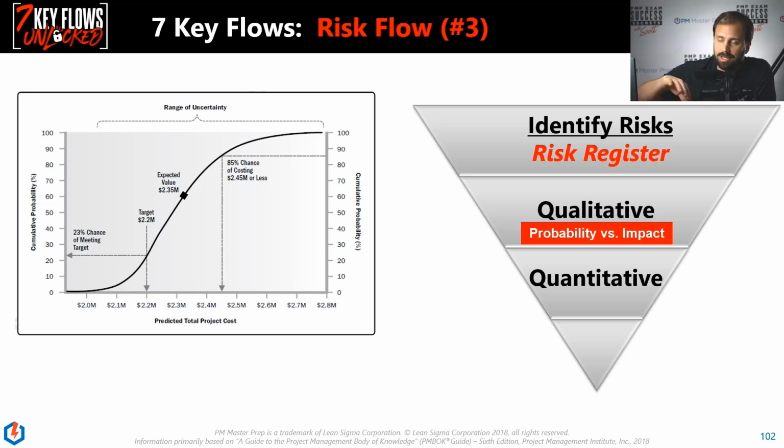And what it does is it creates a curve. These are just little dots really close together, thousands and thousands of dots, and it makes a curve, all right? And so here's the example right here. There's an 85% chance of our project costing 2.45 million, we see here and here, or less. All right, so it's a worst case in a sense. So that shows the overall profile.